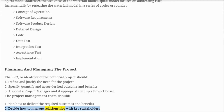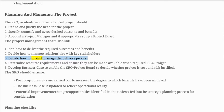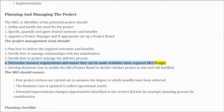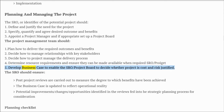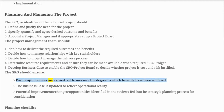The project management team should plan how to deliver the required outcomes and benefits, decide how to manage relationships with key stakeholders, decide how to project-manage the delivery process, determine resource requirements and ensure they can be made available when required, and develop a business case to enable the SRO/project board to decide whether the project is cost and risk justified.